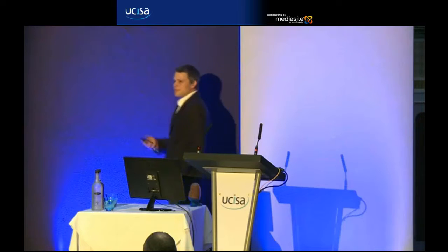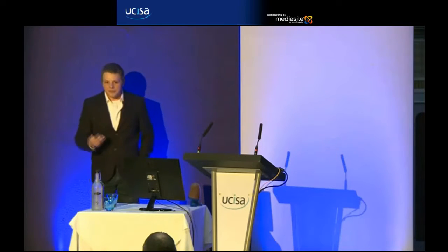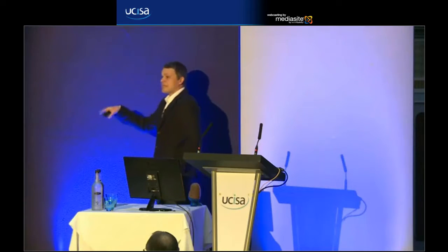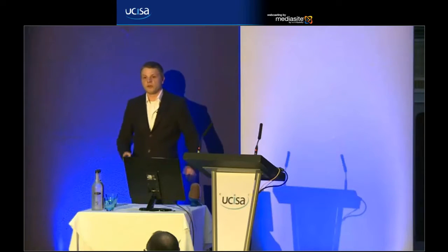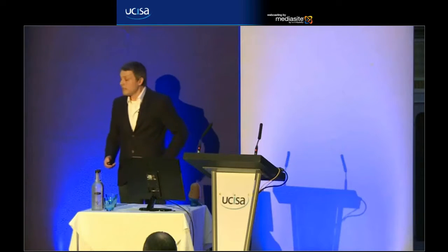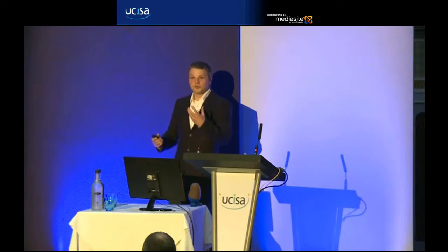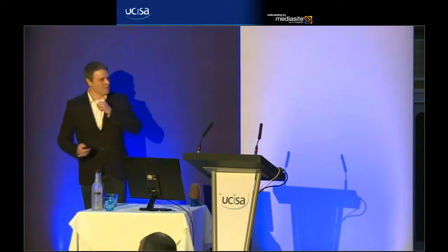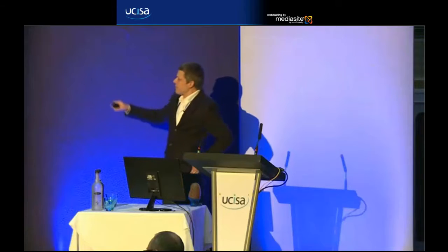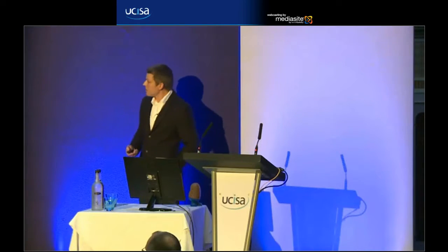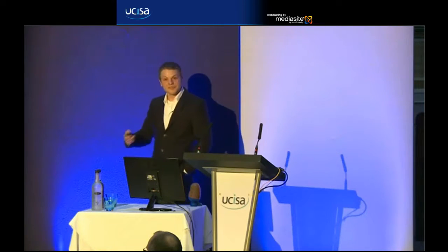So one of the techniques that we use in gathering requirements for a project in Agile is something called Agile Stories. We get together, all the team that's going to be involved, the developers, the users, the customers, project managers, around the table, and we actually use these pieces of paper. We go old school, and we use a piece of paper like this, which is slightly oddly formatted, where we've got 3 things on it, which says, as a type of user, we want to do something so that something else will happen.